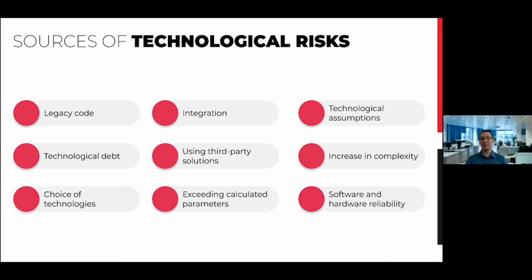Also, it may be using of third-party solutions. Each time we use some library, there is a risk that this library will not work as we assumed. So we will have to redo this work or even implement this functionality by ourselves. Of course, it will have negative impact on the project cost and duration.